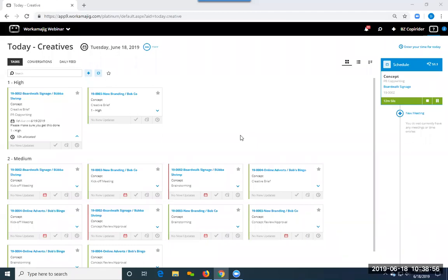But yeah, I could have somebody that works 3 out of the 5 days, and I have another person that works 2 out of the 5 days. And so changing it on that one assignment only affects that one person. But in general, when you're adjusting at the task level, then you are adjusting it for both people.